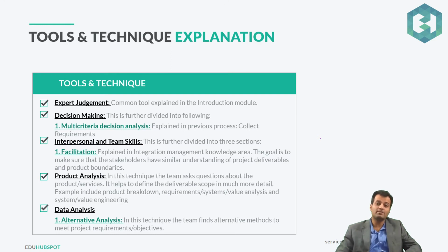The three examples were the JAD session, joint application development. Then we have the QFD, quality function deployment, and then the voice of the customer, if you remember that example. And then the third was the use cases, so user stories. So all those were part of the facilitated workshop where multiple stakeholders come under one roof and try to describe the scope.